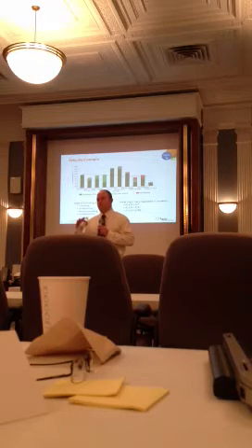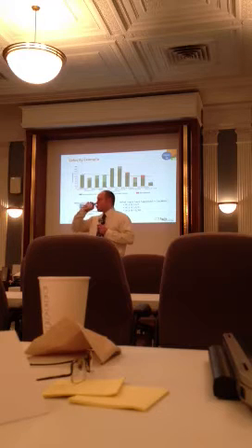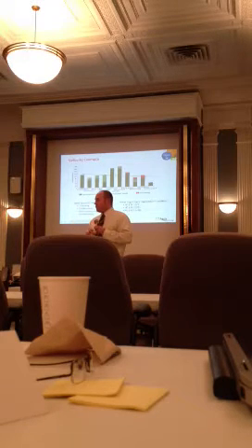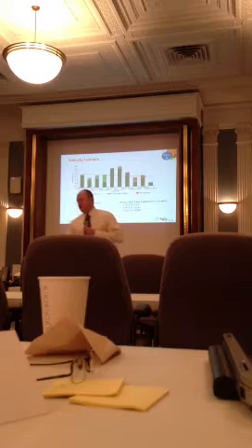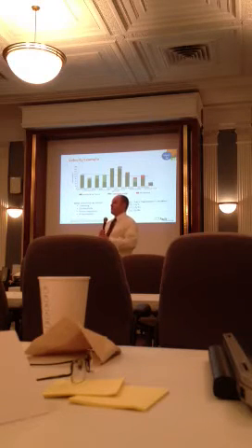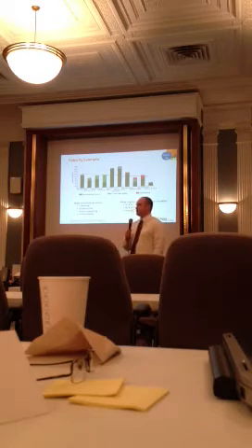So it's additional work. But the red doesn't signify the work is not done. Red signifies it's not accepted. Not accepted means it's not done. But we're not deploying if it doesn't get accepted.